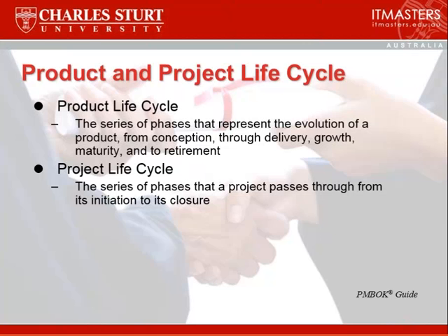But once you've decided that, yes, it's a feasible proposition, let's go ahead with it, you then start the project. The project then delivers your product, and it goes into operation mode. It gets produced and sold out in the marketplace for the next 3, 4, 5 years. Eventually somebody says, we don't need that product anymore, we need to retire it and put it to bed. So all that, from the start to the finish, is the product life cycle.